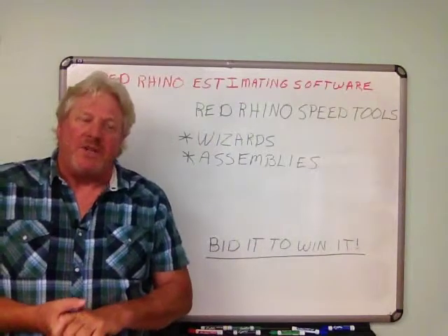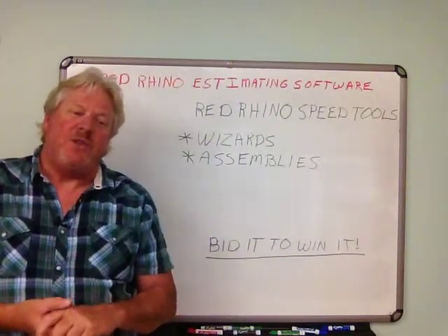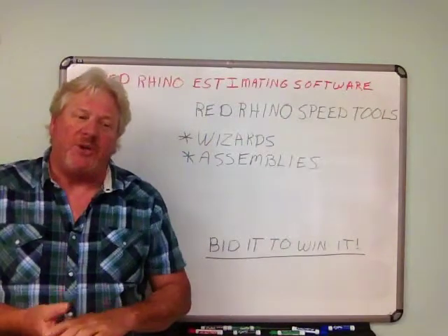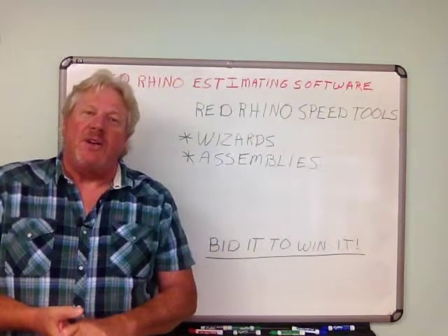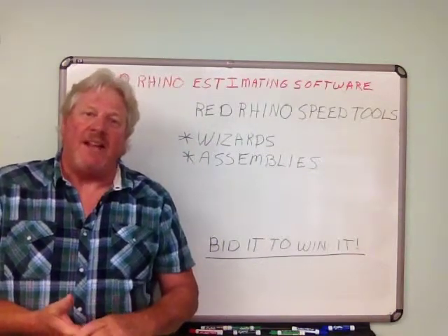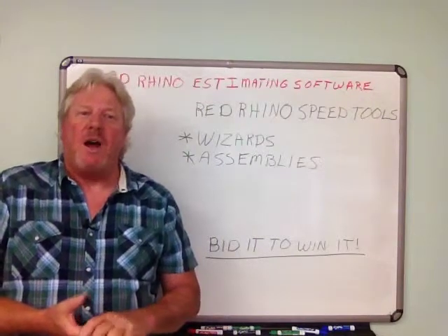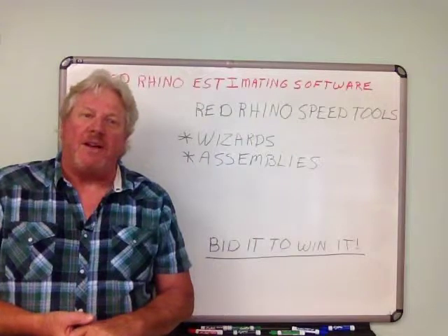The Conduit Wizard is our rock star tool. After you measure the total length of the conduit runs from the blueprint or drawing and use the Conduit Wizard, it spits out both material pricing and labor for conduit, couplings, connectors, supports, and total footage of wire needed. It's pure torture to estimate conduit without a Conduit Wizard.